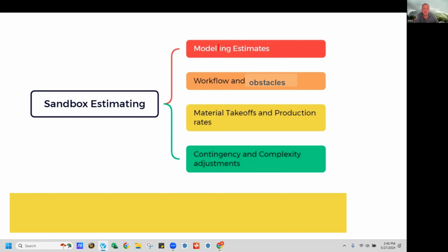So when you create your estimating book, you want one specific for that. For decks, this is the book I'm going to use, and that's how you model that book. You do the same thing for each of your products, not your tasks, but your products. You can also do it for tasks, like if you do major tasks, like if you're a foundation person. If that's what you do, you can definitely do it for tasks as well. But essentially, that's what I mean by modeling your estimate.